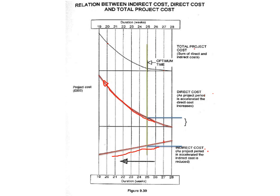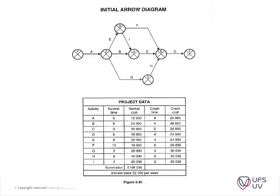Getting into the example: figure 9.40 shows a construction sequence involving activities A to I in arrow diagram format. The tabular data indicates the normal times, normal costs, crash times, crash costs, and the indirect costs of the project, which amounts to two thousand pounds per week. You can start reading from page 189.